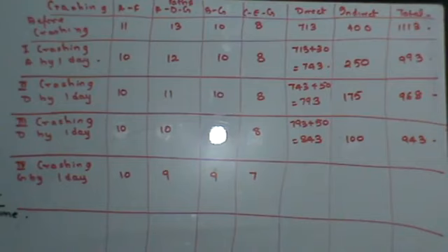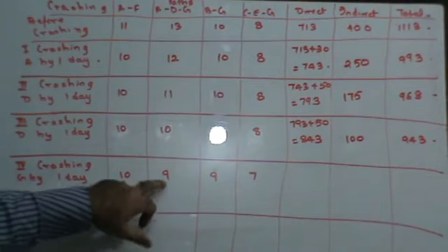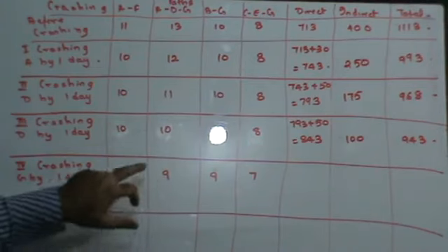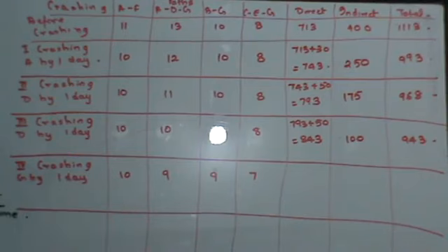Now the rule says that my critical path should be the path which is of maximum duration. Here my critical path is not of maximum duration. To keep the critical path of maximum duration, I'll have to crash here also. The activities I could crash here is either A or F, right?